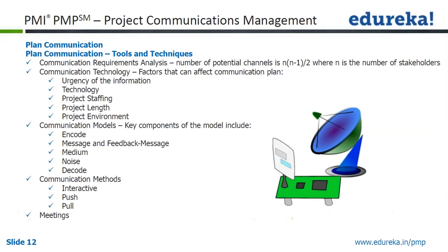In these two situations, this is analysis towards the kind of requirement from the stakeholders, and we have to ensure that we are capturing the information which contributes to the success of the project, or a lack of that communication can lead to failure. Only those communications will be analyzed, because you want to keep the communication cost minimum.